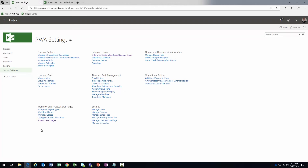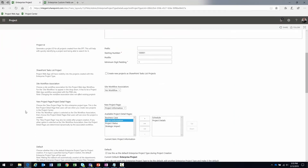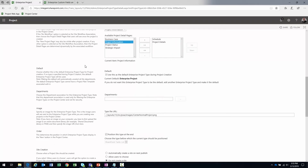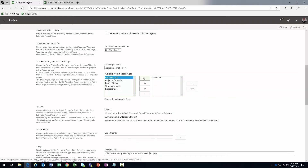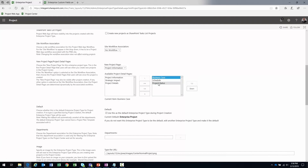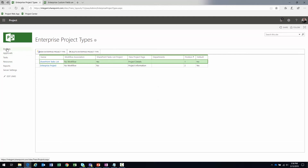Now we need to replace the current pages with our new ones. Enterprise Project Types pull these components together, so we'll modify the Enterprise Project Type. In the PDP section, we'll remove the dynamic 'Project Details' page, add 'Business Case' and 'Project Status,' and reorder them so Business Case appears above Schedule — giving us the order: Business Case, Schedule, Project Status. Save and go back to Project Center.